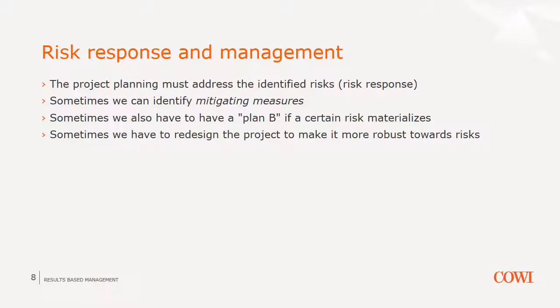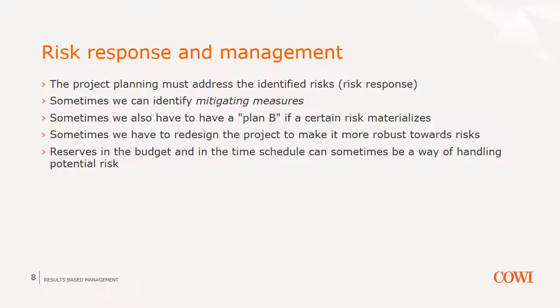Another way of handling risk is to try to avoid them by redesigning our intervention. If there is a risk that a certain stakeholder will obstruct the project, we might consider either to make the project more interesting to this stakeholder or involve the stakeholder even more and have them take even more responsibility. Including reserves in budgets and time schedules can also help absorb the negative consequences of some risks, but it will cost you time and money.